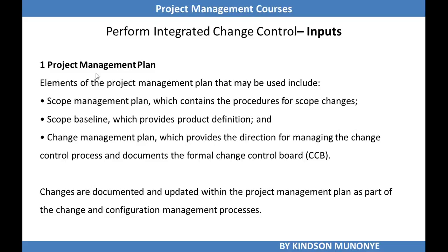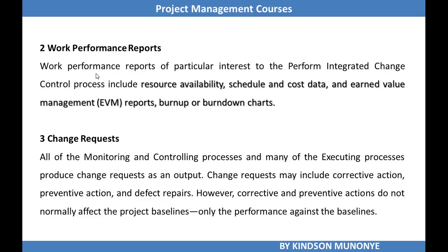An input to Perform Integrated Change Control is the project management plan, which includes other plans and baselines. Changes are documented and updated within the project management plan as part of the change and configuration management process. Also take note that we have the change management plan, an aspect of the project management plan, and it provides direction for managing the change control processes in the project. So this project management plan is a very important input to Perform Integrated Change Control.